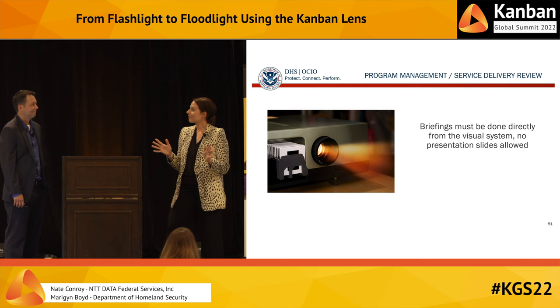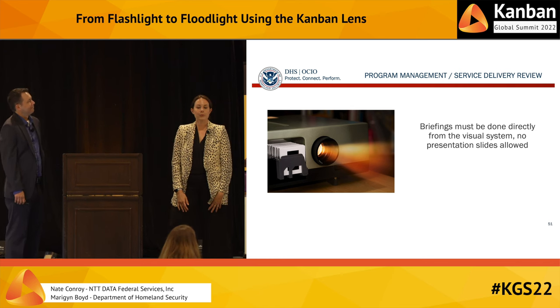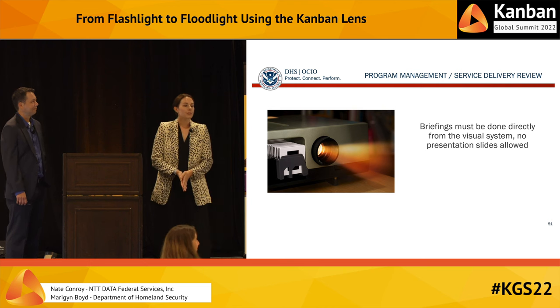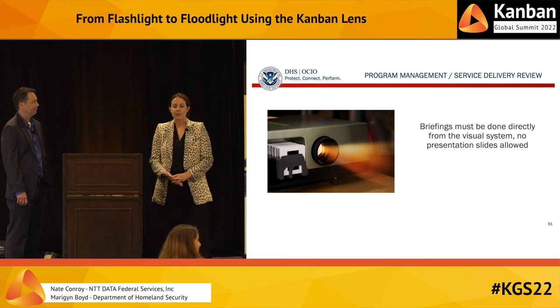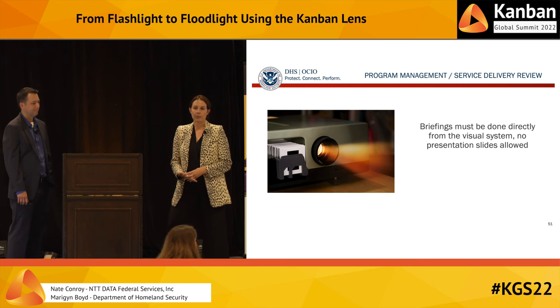And so we're having a lot of fun today presenting from slides, but in our program management reviews, slides are banned. So briefings have to be done directly from the visual system, and no presentation slides are allowed. That ties the information in those briefings directly to the flow metrics, which makes the information more credible, and our senior leaders find it more trustworthy.